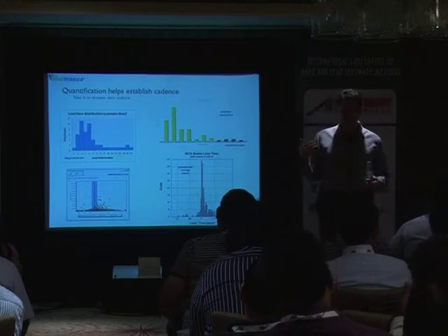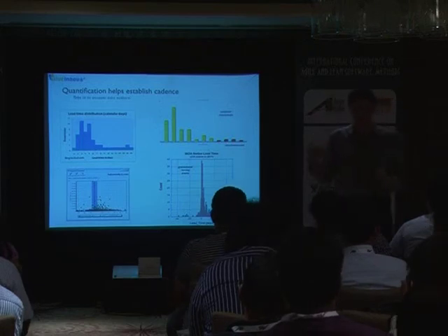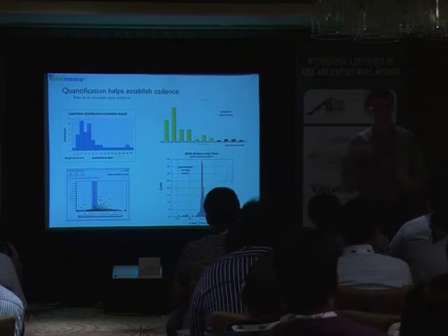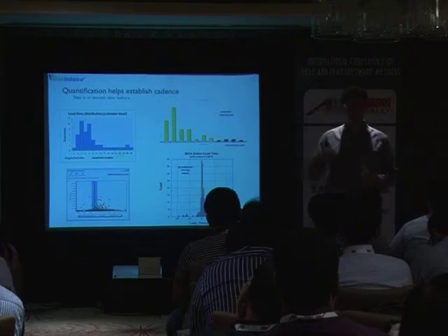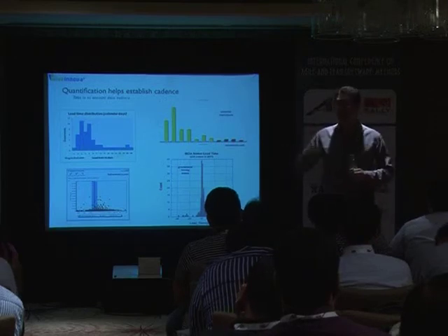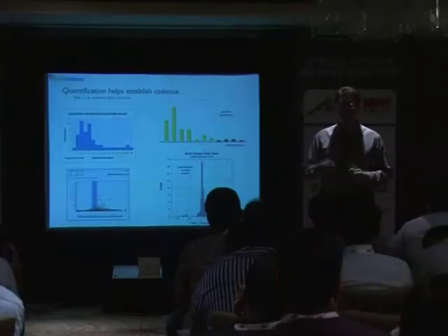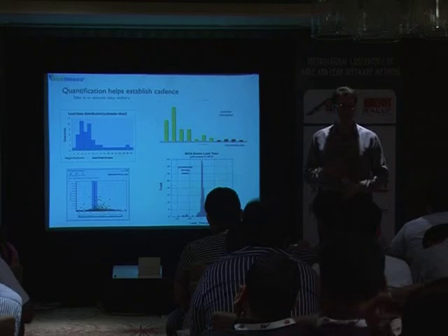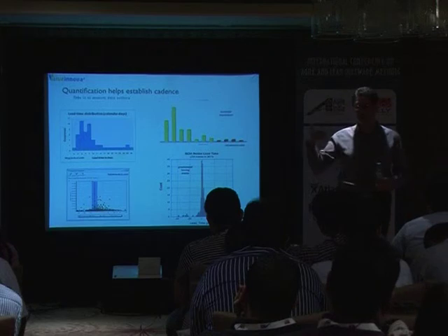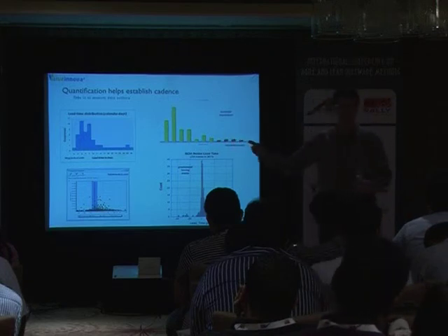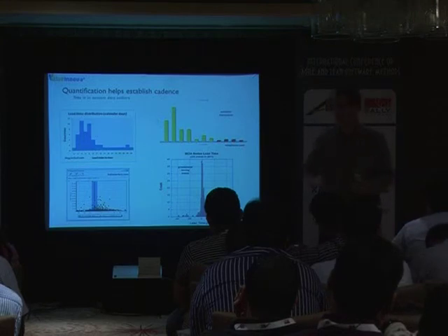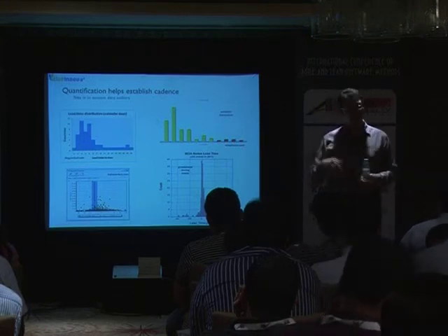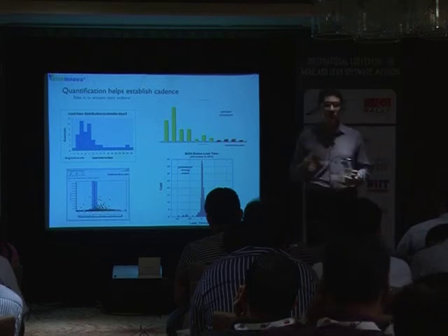And actually, I'm going to take advantage to mention this. If in your organization you have a team that is already a very highly effective, very mature Scrum team, try removing the sprint. The moment you remove the sprint, the productivity is going to go up. Because the sprint brought the discipline, but if the discipline is already there, it starts being an element of friction. Like, we could do more, but now we are limited. So you could try that. Many teams have done it, and they get shocked by the improvement.